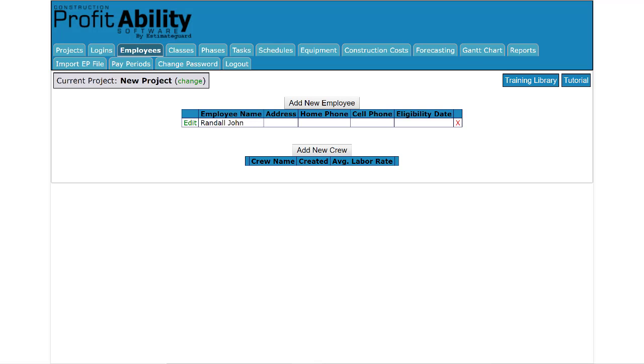On many tasks such as wire pulling, underground work, or in the case of solar contractors, racking and module installation, for example, it is often easier to create a crew and schedule the crew instead of having to constantly select individual employees. This also makes time entry easier because when the crew leader enters their time, the entire crew time will be entered as well. Once entered, the time can be quickly edited for workers who may have come late or left early.